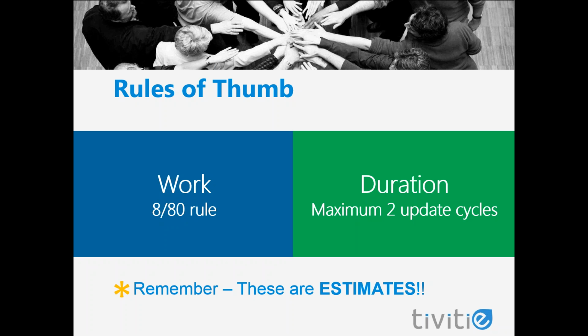We're not going to be talking about statusing in this webinar series, but one of the things that I teach in my regular training courses is that one of the things you're going to be gathering for status is to capture any revised estimates for future tasks that are based on things that you have learned since the original estimates were made. So estimates, keep using that word so that people recognize that that's really what these are.